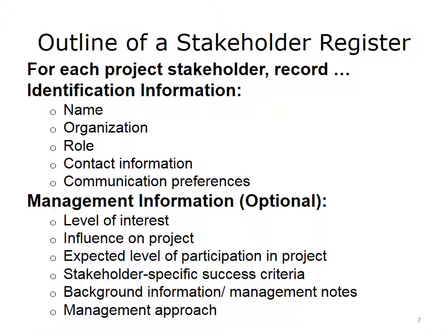If the register is meant to be a useful internal document for you and your project team, the access to it must be controlled if it is providing support to your effort. In that sense, if you have that access control, you can use it as a way to provide important background information. An example of information that can be useful in terms of managing stakeholders and their expectations is whether individuals on your project team may have personal relationships or prior professional relationships with customer representatives.